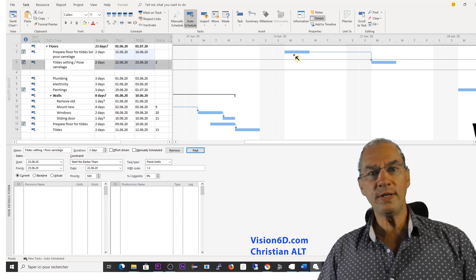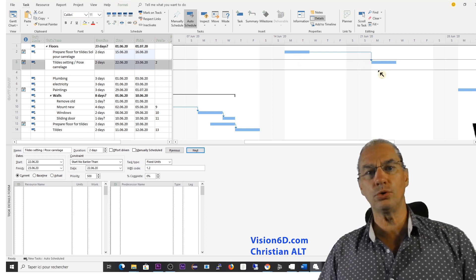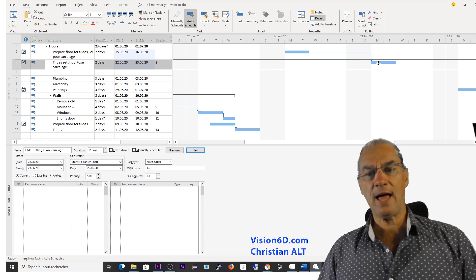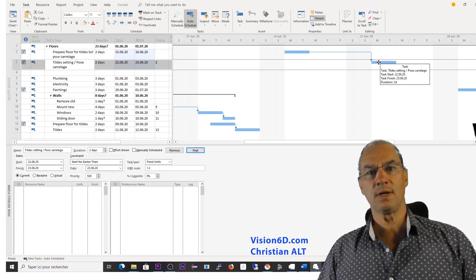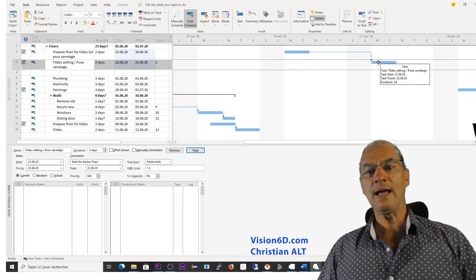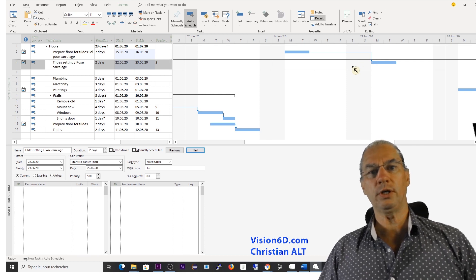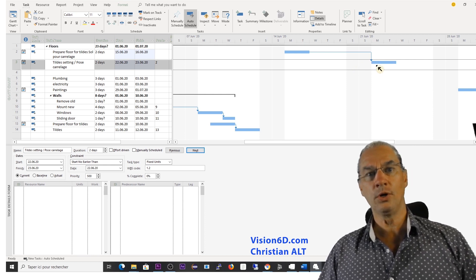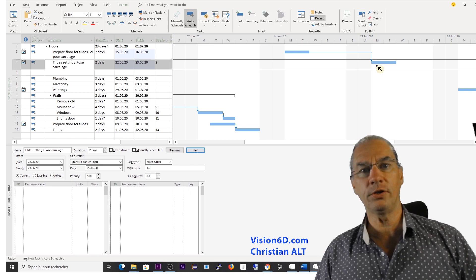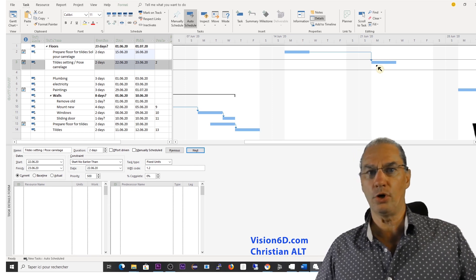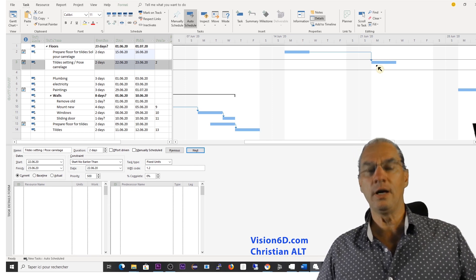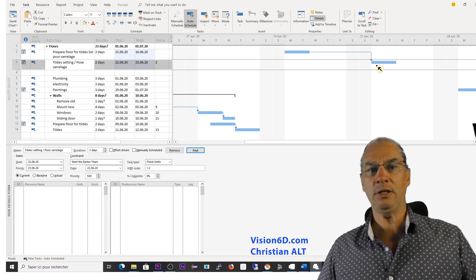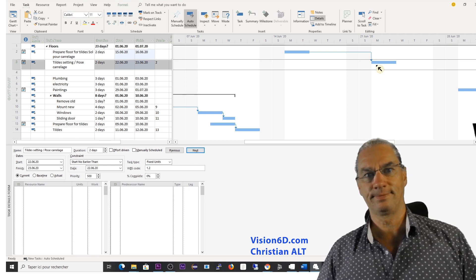And we see here that due to the constraint, the task which is setting the tiles cannot move one week earlier. Because we have a constraint on the date to arrival of the tiles. I mean the delivery of the tiles.